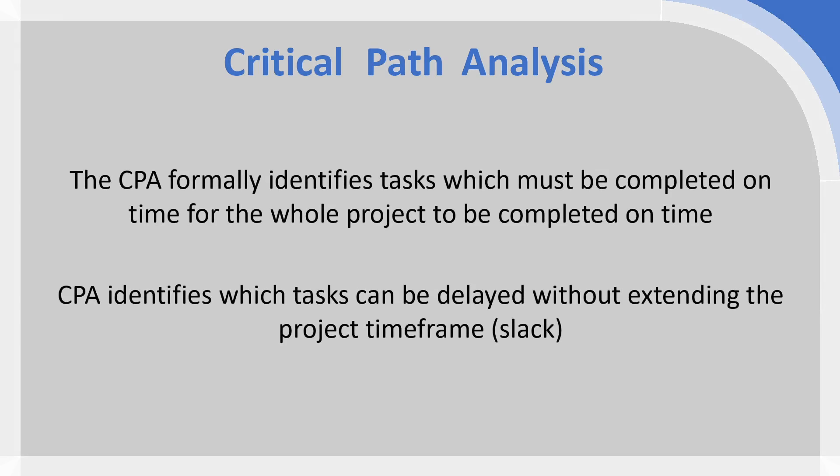If we first define CPA, it's a method of identifying tasks which must be completed on time for the project to be completed on time — that is the critical path. When you find the critical path in your project, it refers to that sequence of activities which cannot be delayed; if any of those are delayed, then your project is delayed. You're also identifying those tasks which can be delayed without making your project delivery late — these tasks have what we call slack or float, meaning they can be done later than originally planned without causing an overall project delay.